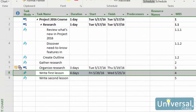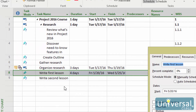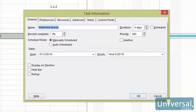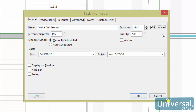Earlier, we learned how to set duration. When we open up the Task Information dialog box, you can see a checkbox called Estimated next to the duration field. When this is checked, a question mark appears after your duration. You check this box when you are unsure how long a task will take and want to let people know about your uncertainty, or if you need a way to enter exact timing when you have more information.